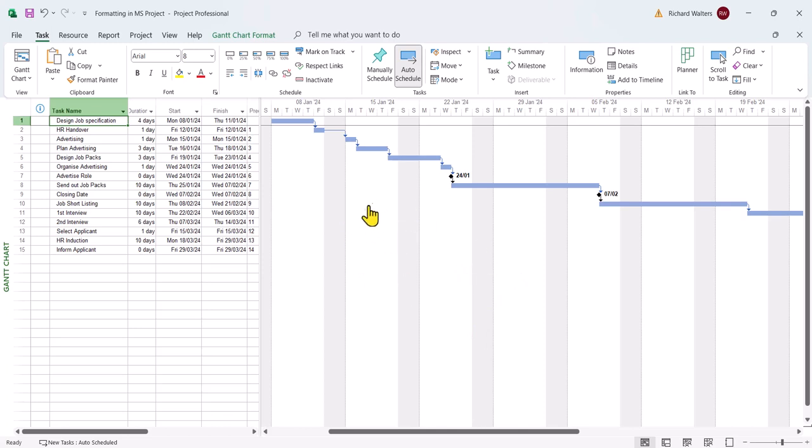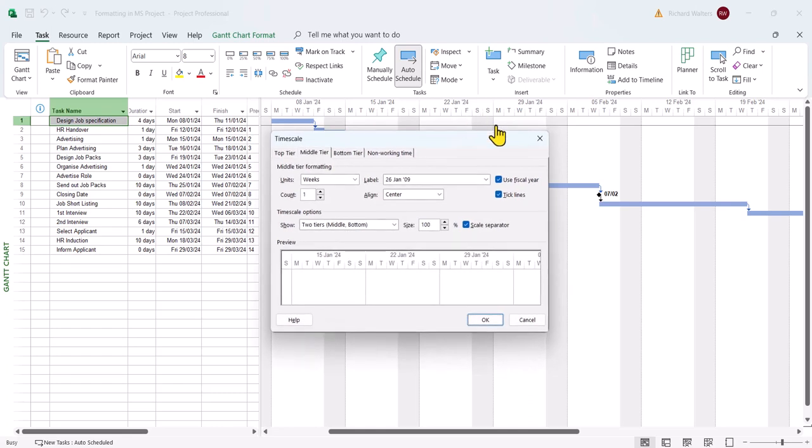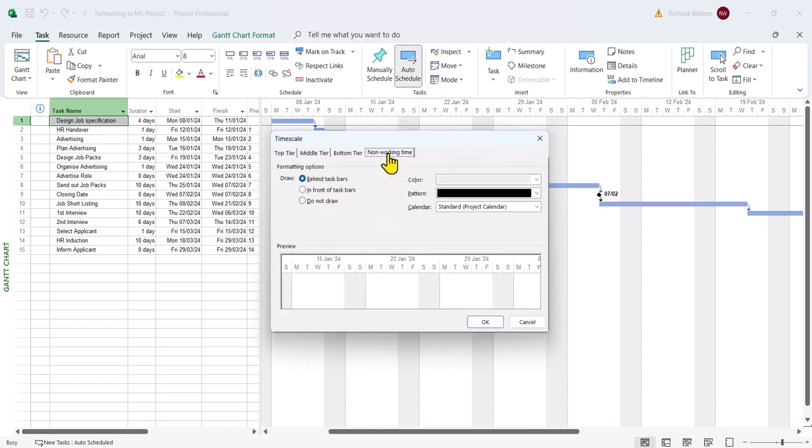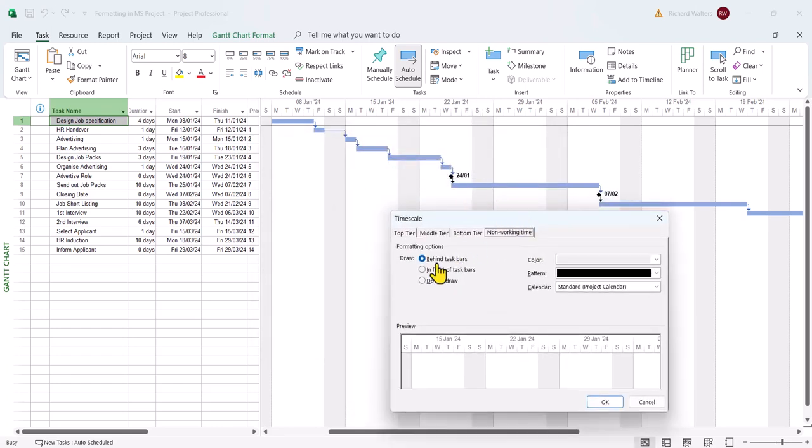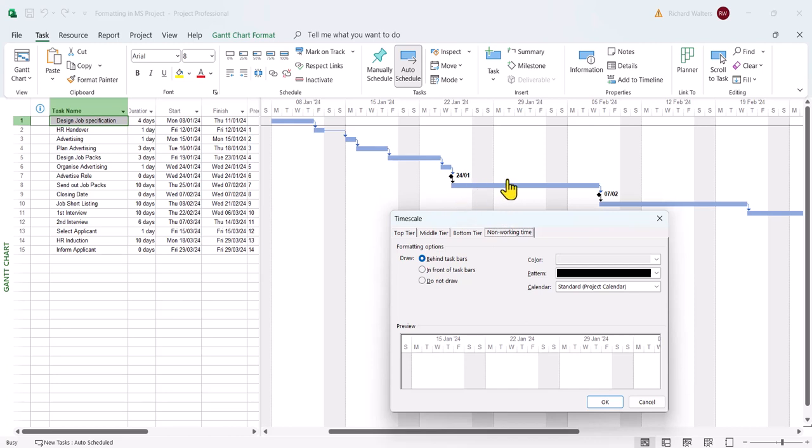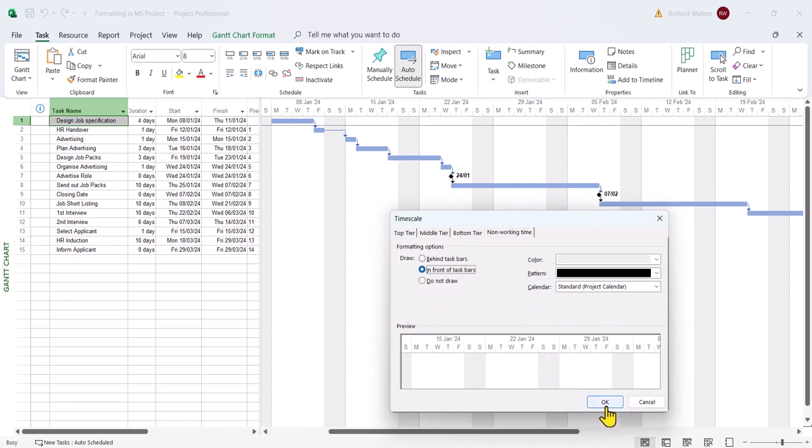Now we might want the non-working bars to have a different appearance. We can do this through the timescale area. If I go to the non-working, at the moment they are behind the task bars. If you bring them in front of the task bars, that means you'll see the task bar only showing when it's working. So you won't see this blue bar going over both weekends. It'll actually segment itself between the weekends. So I'll put it in front of the bars and there we go.